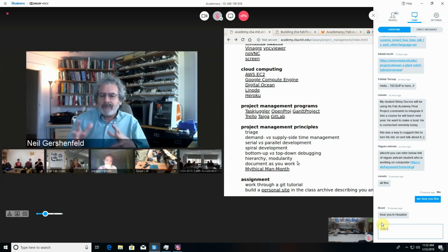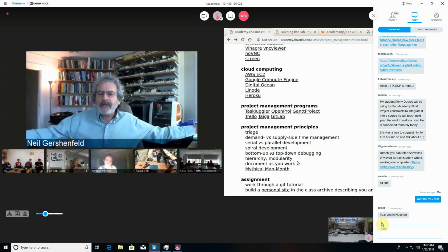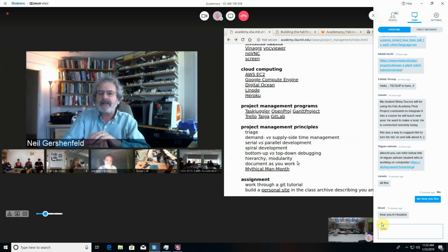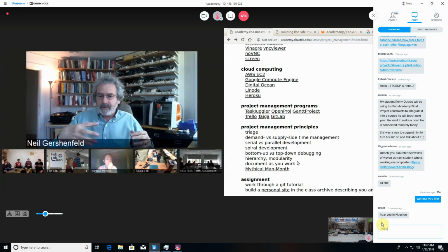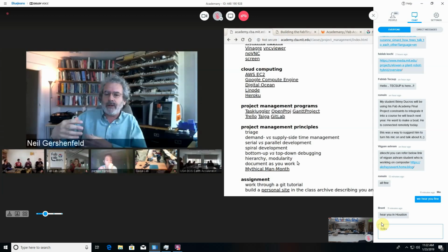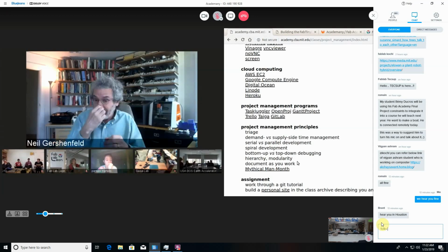And so to really be able to do that, it's very helpful, instead of making one big project, to make your project modular. And we'll keep coming back to that, to build a big project in a number of small modules. So let's say, we had the example of the wearable clothing with jewelry. Rather than making it as a single monolithic garment, you could have one system that's a display, one that's a controller, one that communicates, one that's an interconnect. And each of those you can develop separately and then put them together to make the system.